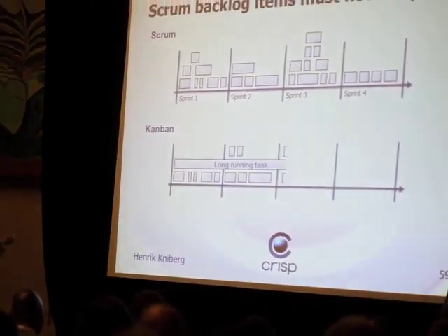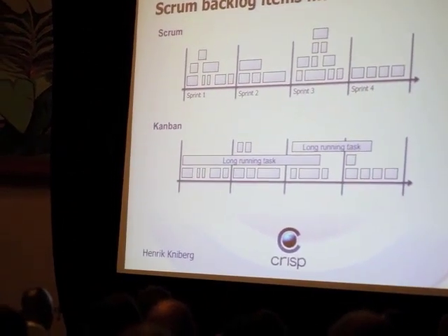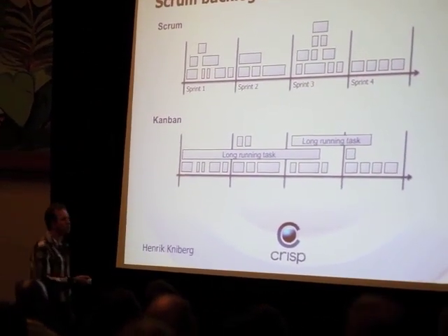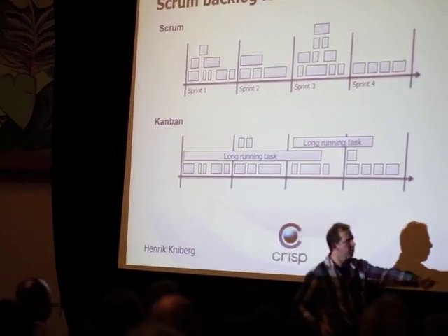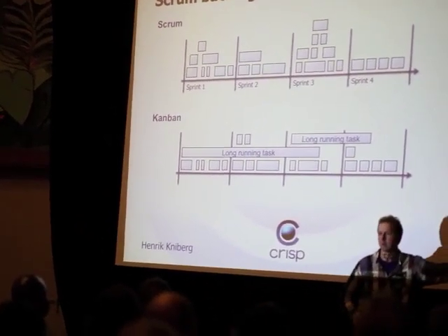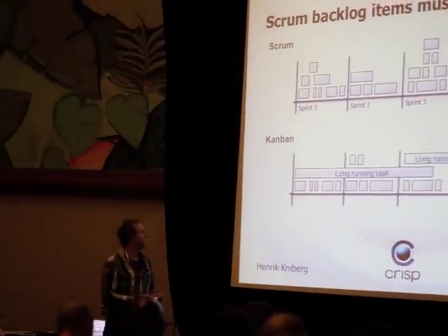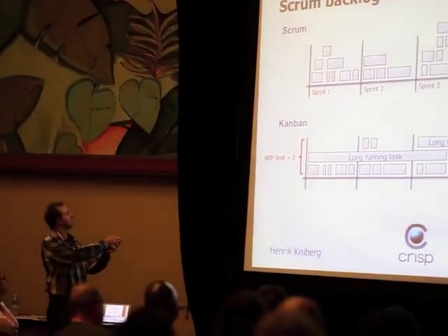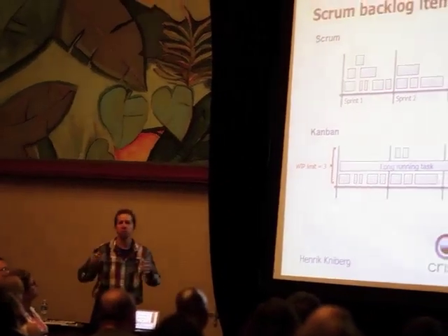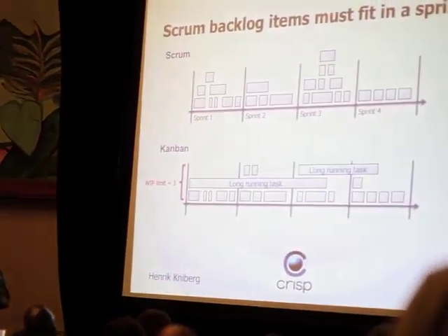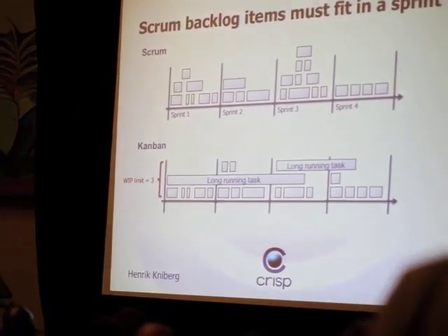So if you don't like this, if it feels like too much pain, you might do Kanban, which allows long-running tasks. So we might, on the same board, combine something here, which takes 3 hours, and this one here takes a week or 2. Right? You can live on the same board. Maybe in different swim lanes. So the limit is here. Right? So if you have too many long-running tasks, the limits are persistent anyways. You're still motivated to break things down. But it's not quite as forced.